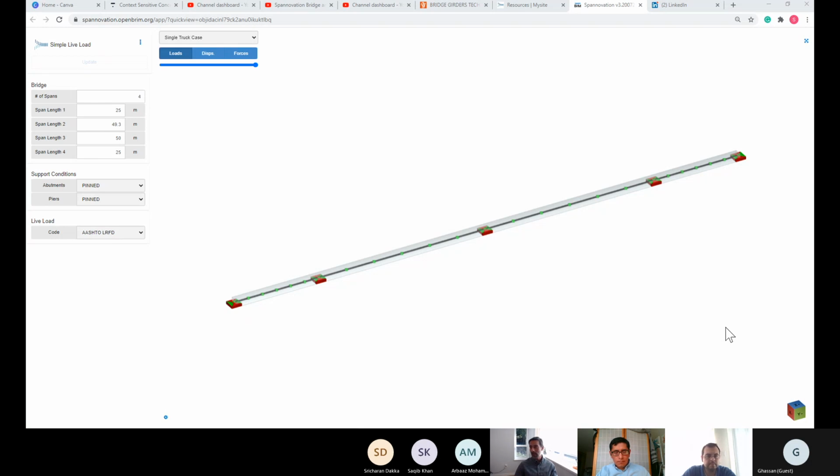One example would be that if you find that conventional erection requires just these ginormous cranes, you might have to think of another method that perhaps could be overhead, such as launching, and it might then influence how you design your bridge. It might require that you detail it in a way that you split your bottom splice plate so your roller can pass through. You keep the soffit of your bottom flange flush, and wherever this thickness changes, you take care of that in the web. Things like that would change based on which would be the most feasible method of actually erecting your girders.